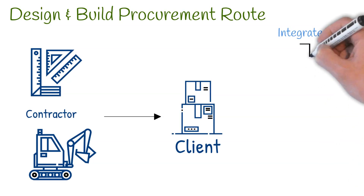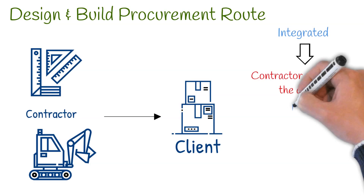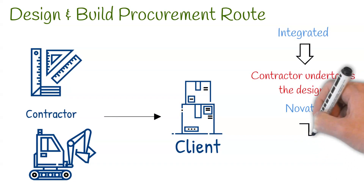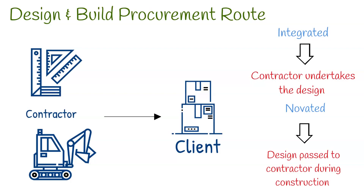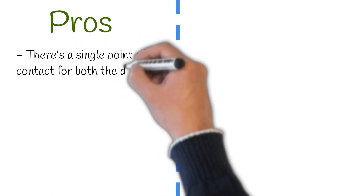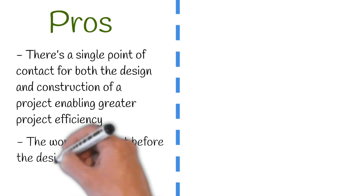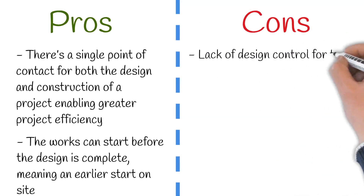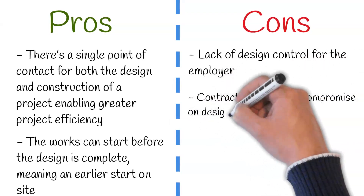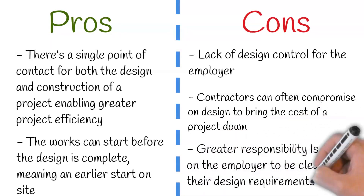Under integrated design and build, the contractor undertakes the design and construction based on a set of requirements from the employer. Under novated design and build, the employer hires a design team to complete the design before it is novated to the contractor during construction, who will then assume design responsibility. Pros include: there's a single point of contact for both the design and construction of a project, enabling greater project efficiency, and works can start before the design is complete, meaning an earlier start time on site. Cons include: there's a lack of design control for the employer, contractors can often compromise on design to bring the cost down, and there is greater responsibility placed on the employer to be clear with their design requirements.